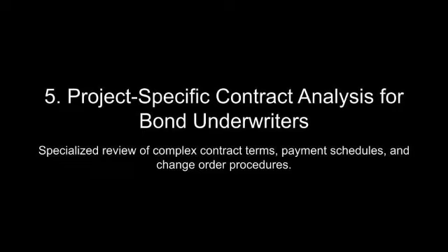Evaluating termination provisions. Underwriting pitfalls. Underwriting pitfalls associated with termination clauses often stem from ambiguous or overly restrictive language. In termination for convenience clauses, the absence of clear guidelines for calculating compensation can lead to protracted disputes. For example, a contract that fails to specify whether indirect costs, such as administrative overhead, are reimbursable creates opportunities for disagreement. Similarly, termination for default clauses that lack detailed procedures for identifying and remedying default increase the likelihood of litigation, as contractors may challenge the validity of the termination.